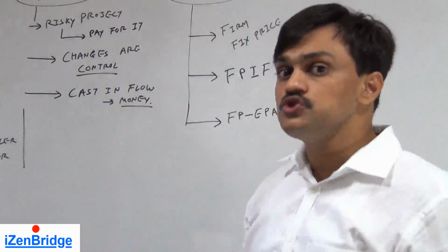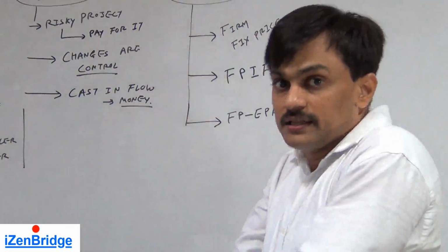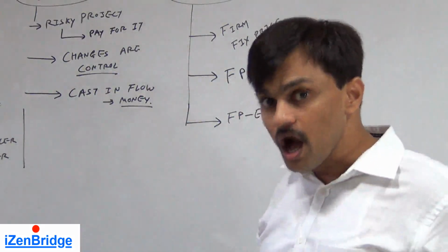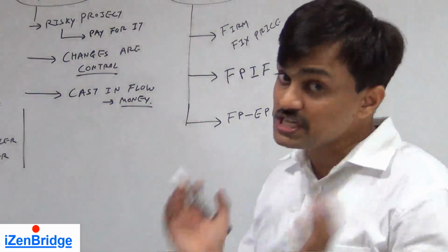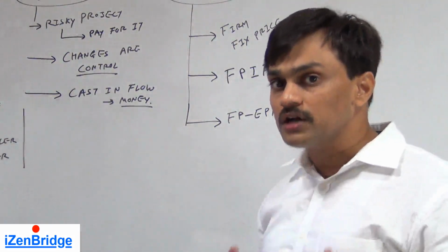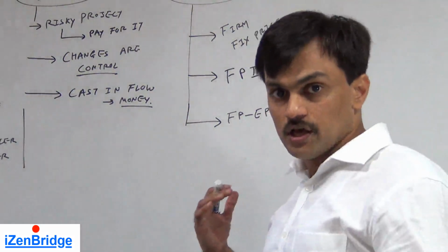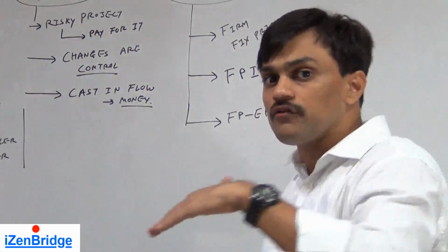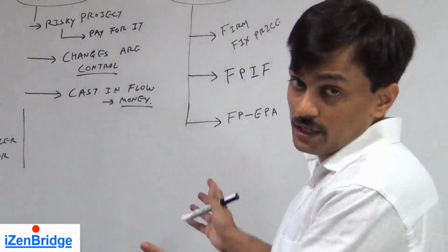If you are consuming a good amount of steel in executing your project, then you may want to put that clause in your project. Okay, I will do this work. I know I have managed my human resource, but steel is a raw material and I cannot bear the complete fluctuation risk of this steel. So I want to put in a clause that on the basis of the index rate of steel, I can change the price of the final outcome.